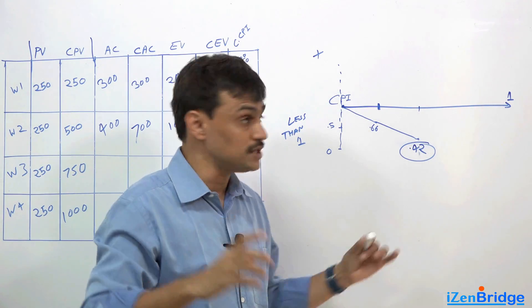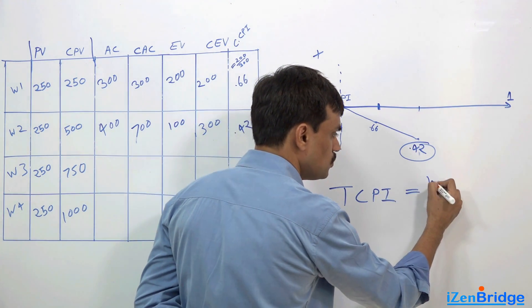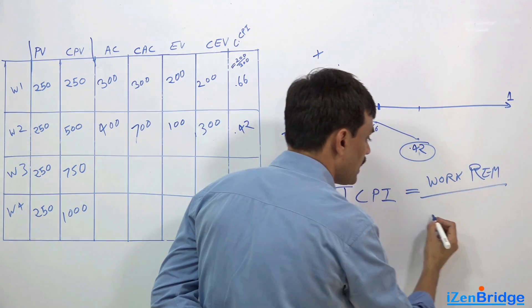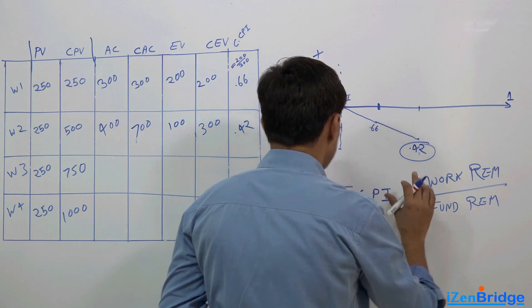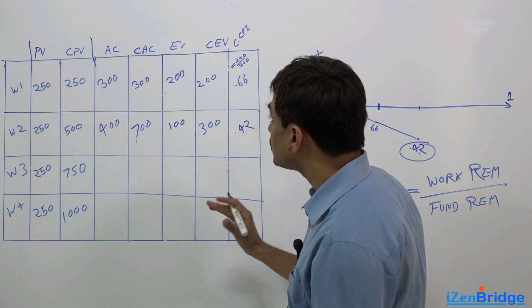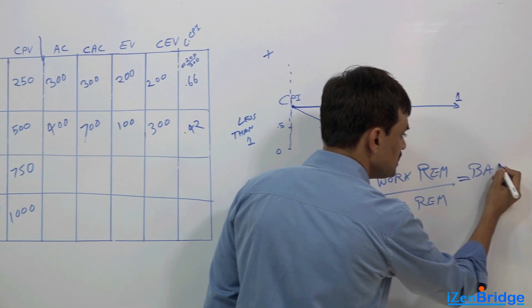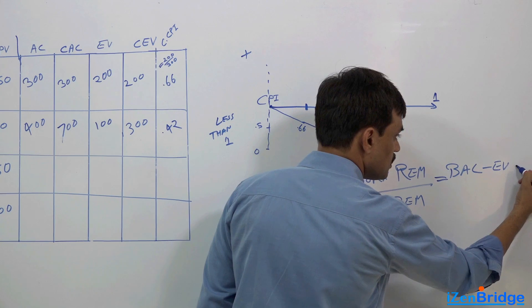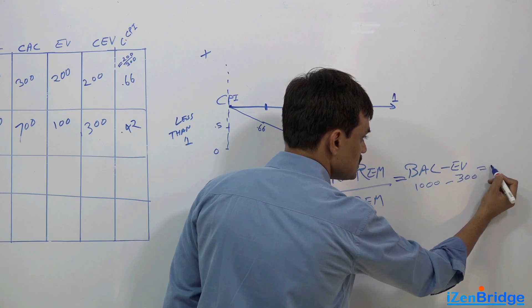Now there could be two situations. We tell that To Complete Performance Index is equal to work remaining divided by fund remaining. Now what is work? By now we have earned work of $300, means our work remaining is $700. So the work remaining is simple: Budget at Completion minus Earned Value. So budget at completion was $1000 and we have done work of $300. So this is $700.